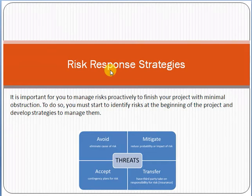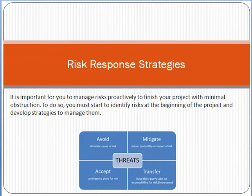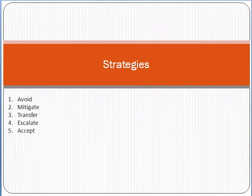Risk response strategies have two categories: one for positive risk and one for negative risk. Positive risk means the risk has a positive impact on the project and becomes an opportunity. Negative risk means it has a negative impact and becomes an issue. For handling negative risk, we have the following five strategies: Avoid, Mitigate, Transfer, Escalate, and Accept. We will see these strategies one by one in detail.